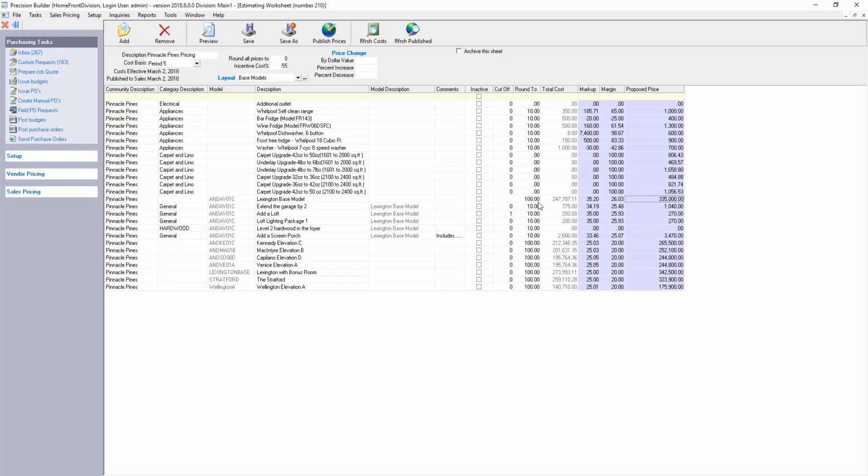We can go through a variety of different pricing analysis where we can type in a proposed price and let it calculate what that translates to in terms of expected profit margin or cost markups. The cost itself can actually be determined based upon a time frame that you use as a costing basis. Because in a pre-sale world, the price that you give the customer is a locked-in number, yet you haven't begun construction yet. So being able to factor in potential cost fluctuations into the basis for your costing becomes a very useful tool.